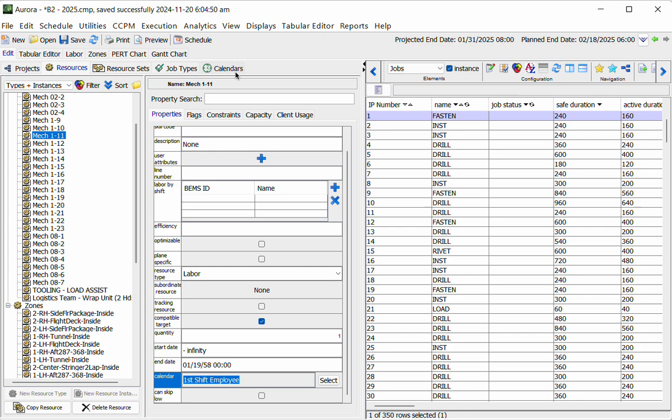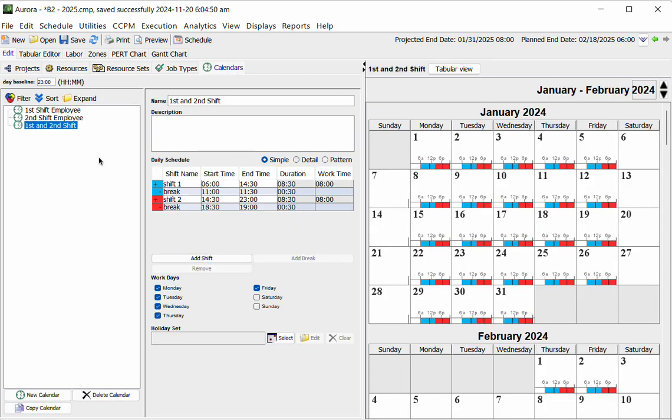In some cases, it may also be applied to the specific jobs or activities. For example, perhaps a job is very noisy, and so it needs to follow the kind of noise restriction, so be between maybe 7 a.m. and 9 p.m. or something along those lines. So there's a lot of flexibility in terms of how you apply the calendars. In terms of the actual scheduling, we take the intersection, so it combines the different calendar restrictions and will then find the acceptable window that honors all of those constraints.